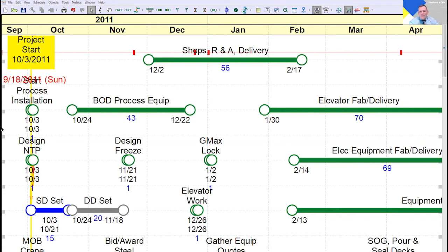You know, it just occurred to me, I had forgotten to mention this morning, and it's probably advanced, which is probably why I didn't mention it, but one of those cool features I showed this morning where you can do an embedded object on an activity and link out to a document or something. One of our clients had this great application where there were certain critical activities they really wanted to keep an eye on. And so they used the embedded object in the activities that they wanted to keep an eye on. And they actually put a webcam out looking at that structure of work that was being worked on. And so anytime that they wanted to check on the progress on that activity, they just went to the link and looked at the webcam, which I thought was so smart.